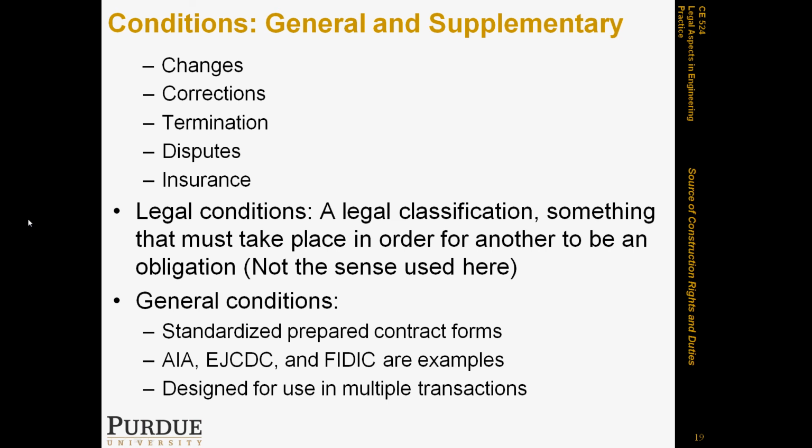However, they sometimes need to be fixed and adjusted in order for you to take into consideration local conditions and conditions that prevail in this specific project, and therefore we have supplemental conditions that supplement those general conditions and describe what needs to be fixed in them in order for them to be exactly applicable to the project.